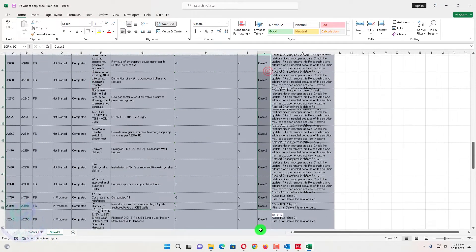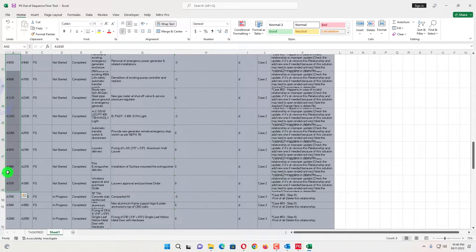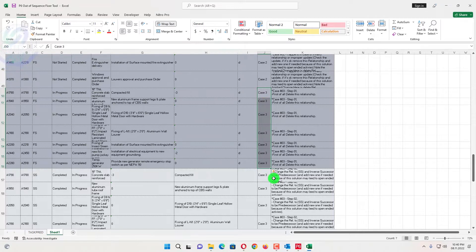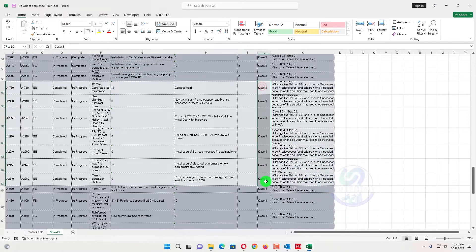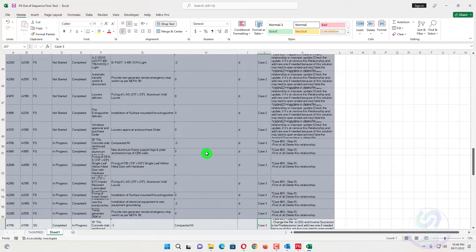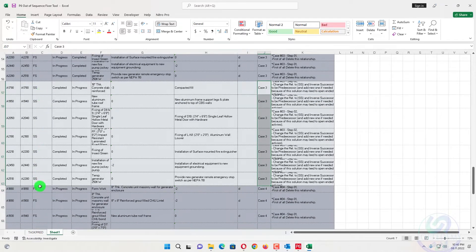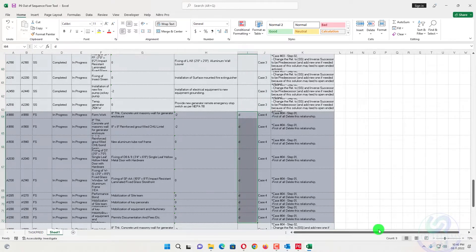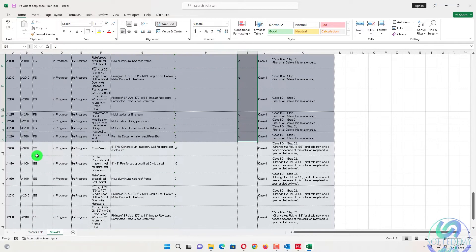In Case 2, you only need to delete the relationships. If there are open-ended activities, you can assign them new relationships for any new critical path. In Case 3 there are seven activities — in-progress predecessor and completed successor. Delete those relationships and add seven new inversed ones with start-to-start. In Case 4, there are nine activities where both predecessor and successor are in progress — no inverse required, just change the relationship to start-to-start.